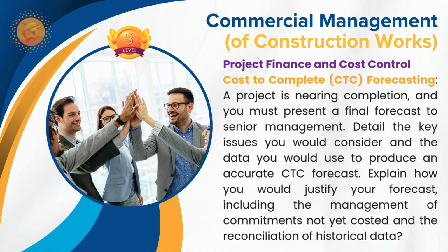Then some of the things that you may find from your risk management that you may need to address, because when you do these kind of things, you will try to adjust the contingency allowance, because contingency allowance also you cannot utilize completely.